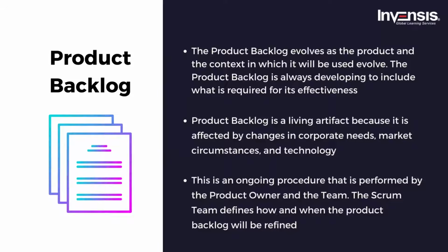Product backlogs exist as long as a product does. As the product in development is utilized and gains value, the product backlog develops in scale and scope. Product backlog is a living artifact because it is affected by changes in corporate needs, market circumstances, and technology. Adding descriptions, estimations, and priority rankings to the product backlog items constitutes refining the product backlog. This is an ongoing procedure that is performed by the product owner and the team.